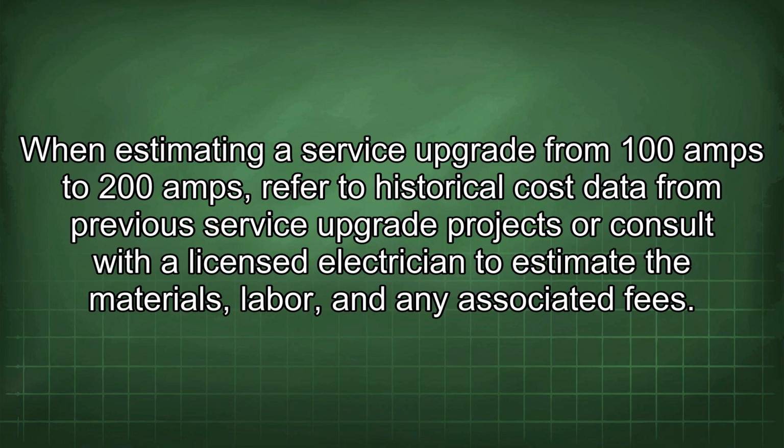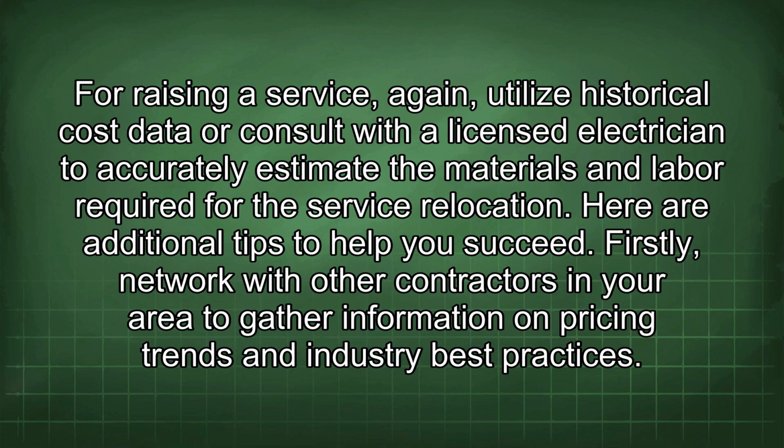When estimating a service upgrade from 100 amps to 200 amps, refer to historical cost data from previous service upgrade projects or consult with a licensed electrician to estimate the materials, labor, and any associated fees. For raising a service, again, utilize historical cost data or consult with a licensed electrician to accurately estimate the materials and labor required for the service relocation.